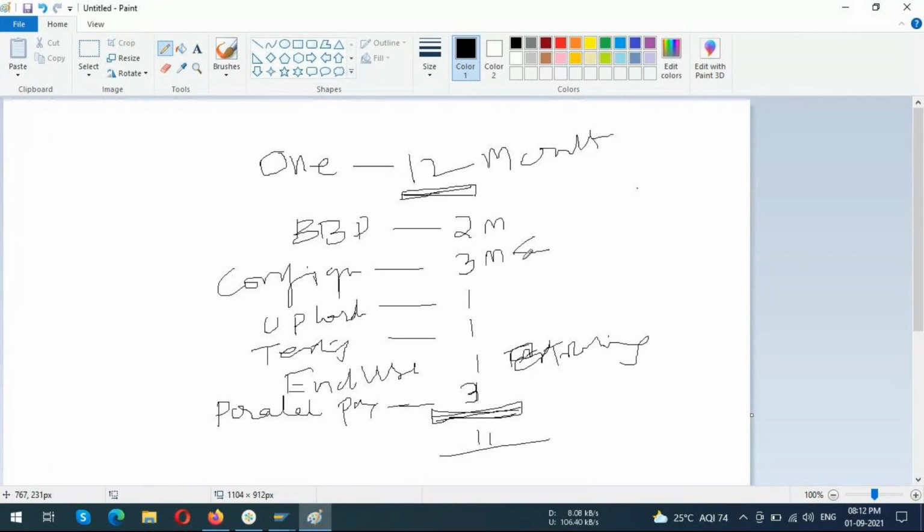If your company is a very big company, if their timeline is 2 years, you can run the parallel payroll for 6 months. That also includes testing with the end user. The end user as well as the functional consultant, both will sit together, run the payroll and see the output of SAP, the payslip and so on. So if you take the one month period, these are the timelines.